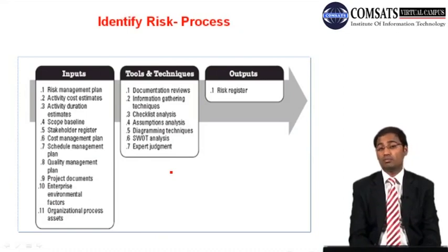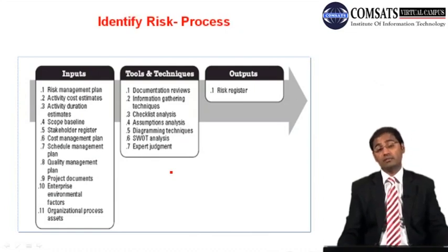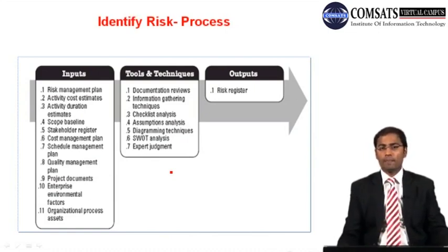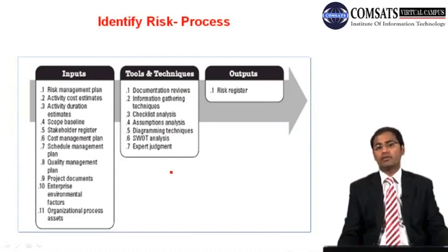And what do you mean by scope baseline? Initially that was scope statement in plan risk management, but over there you are having scope baseline. What is the difference between scope baseline and scope statement? So scope baseline includes the project scope statement, plus WBS, plus WBS dictionary. The WBS dictionary is the explanation of work breakdown structure elements. Okay, so all these three make this scope baseline.